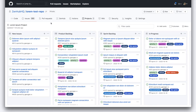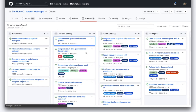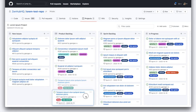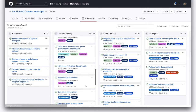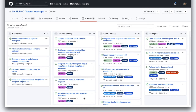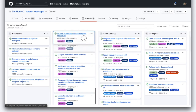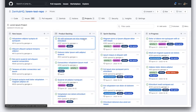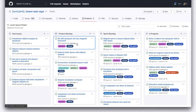The way that you can prioritize work in a Kanban style board is by moving cards up or down. If you decide that something is no longer a high priority, then you drag it down. And if something at the bottom becomes the most important thing you need to work on, you drag it all the way up to the top. You can also filter the cards using the same search syntax. So it's a pretty good way for an individual to add some workflow to your GitHub issues.